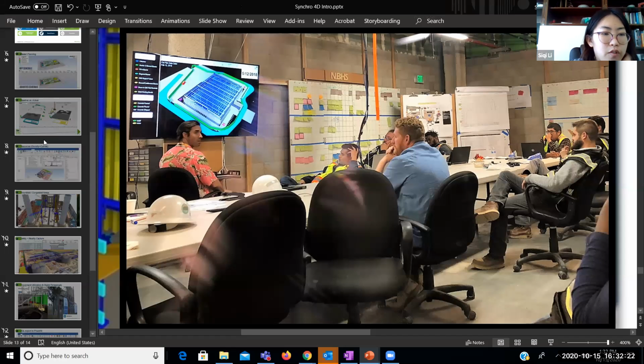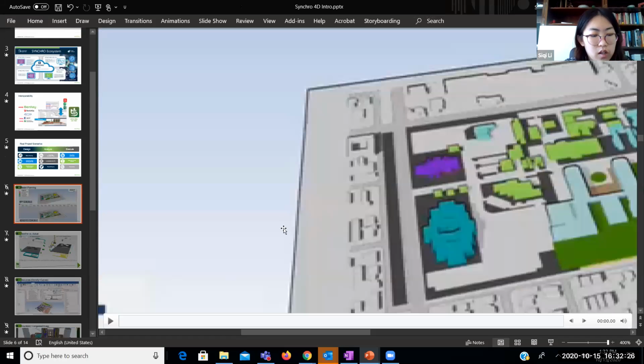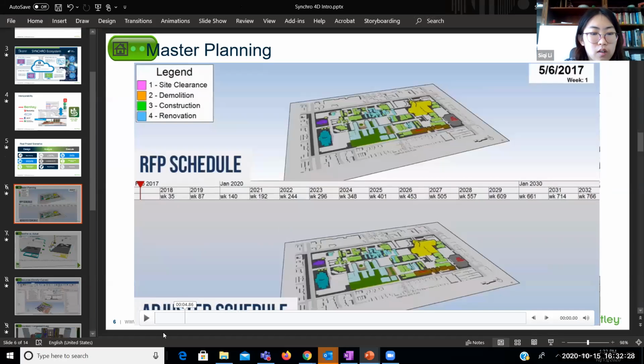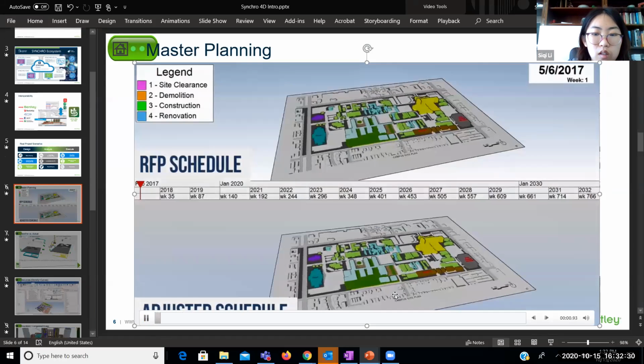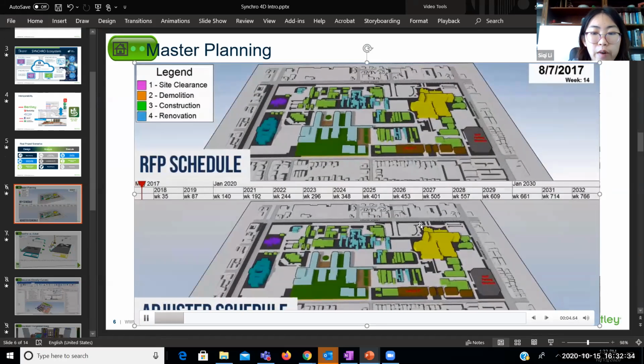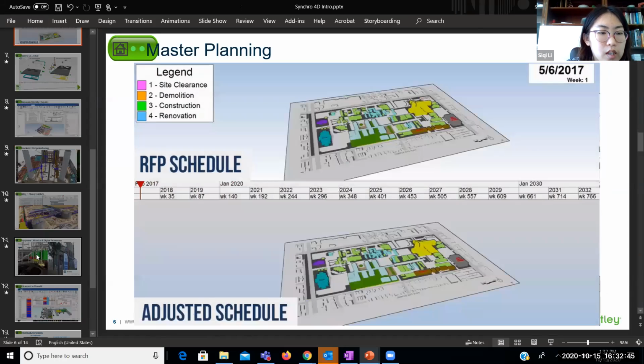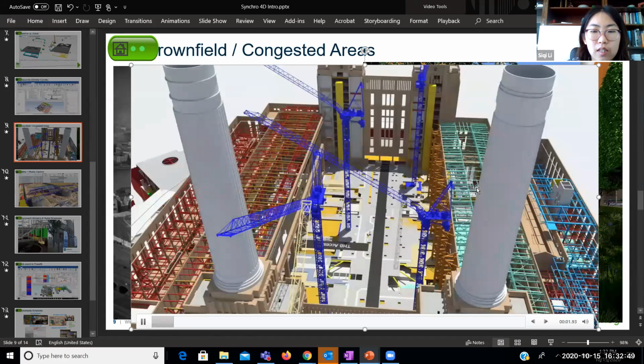For example, for a building, you can create a very rough schedule, like assign this whole area to task 1, area 2 to task 2. If that's the case, it will take no more than 1 hour to create the simulation. In another case, let's say you want to create a very detailed simulation like this animation.